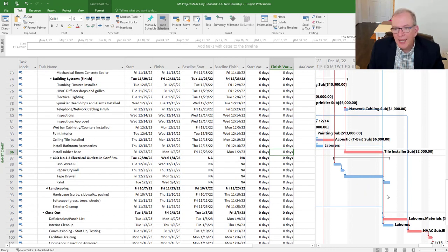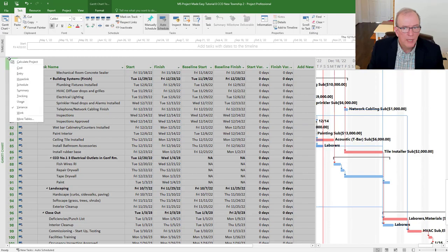They don't connect the change to what it's going to impact. Unless you connect the change to what it's going to impact, it won't show you the impact. It's an open end, and we've discussed this in previous videos as well. You want to make sure that all your activities are connected to what makes sense on your project. So I'm going to go back and make a connection.